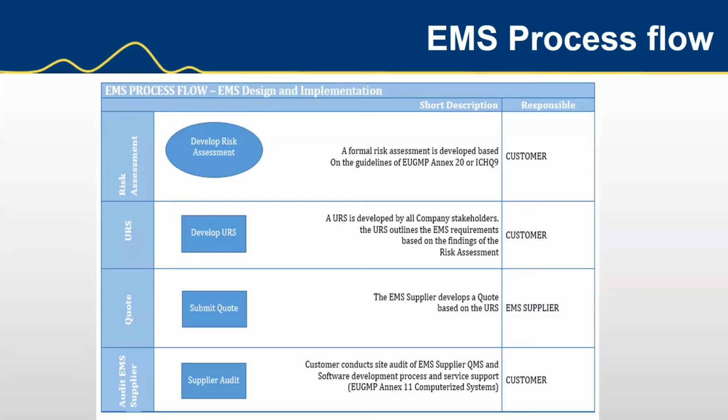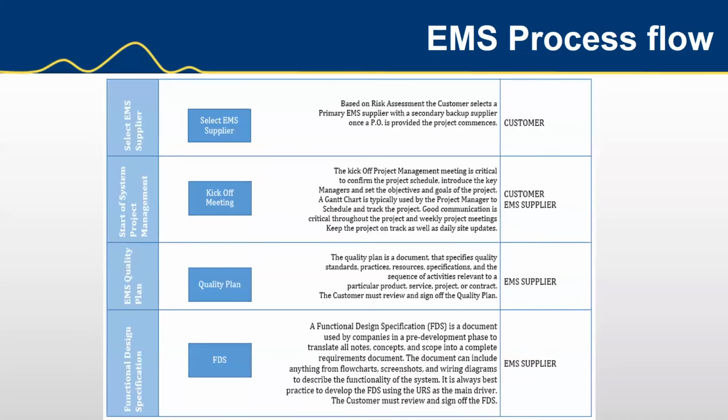So these are the initial stages of the EMS process flow, and each stage is significant as we move along the process. Once the customer has selected the vendor, it's really important to have a good kickoff meeting with that vendor, because all the details need to be discussed, all of the aspects of the project, who's involved, the different stakeholders, especially their friends in the IT department. Get them on board early so they know what's involved, because in my experience, they have always been the path to a lot of resistance.